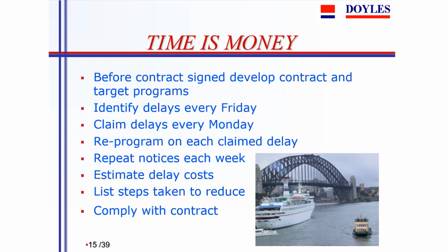You've also got to estimate your delay costs. If the delay costs are going to be practically nothing, then it goes without saying it doesn't raise a big problem. But often contractors don't estimate delay costs, and then after 2 months or 3 months of delay, they realise that it's having a massive impact. It's better to be early and, if necessary, wrong, rather than to be late and even if right.